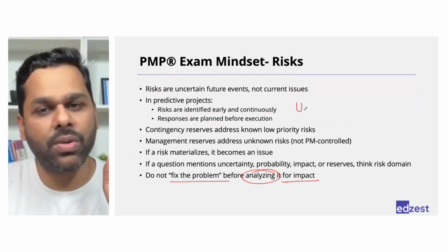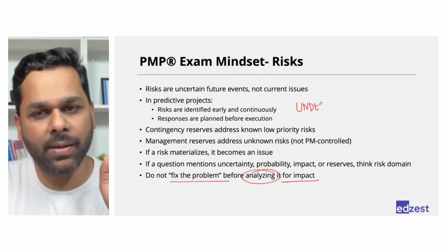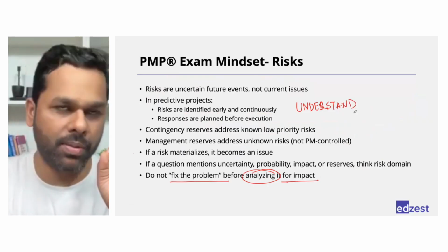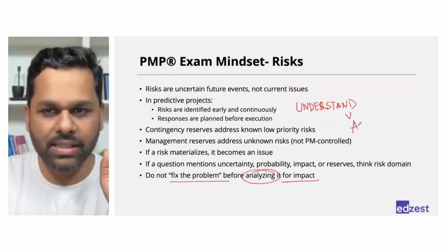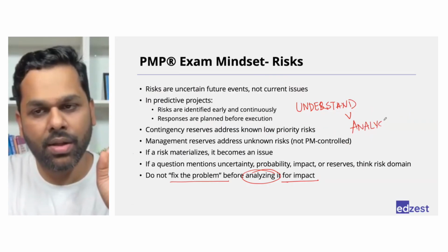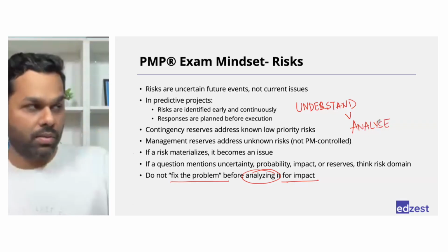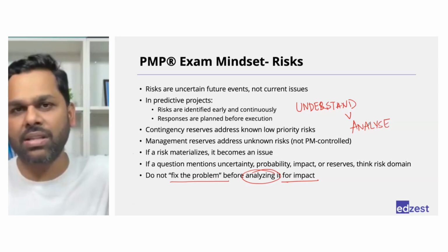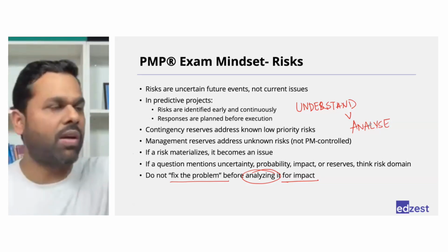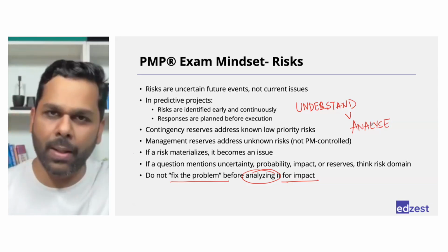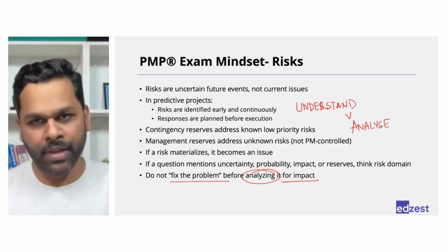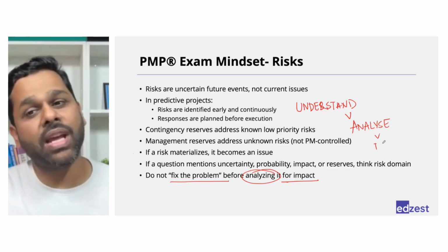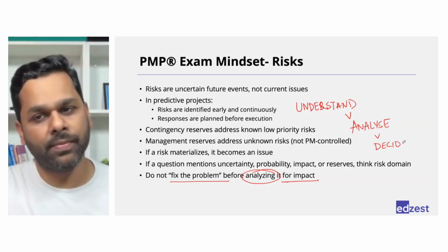In your exam, your sequence is first understand the situation, understand the change, understand the problem. Then analyze. What would be the impact? What is the priority? What is the probability? Why has this change been asked? How will it impact my cost? How will it impact my schedule? How will it impact my quality? Analyze it thoroughly. Right? So first understand, then analyze, and only after that you decide what is to be done.